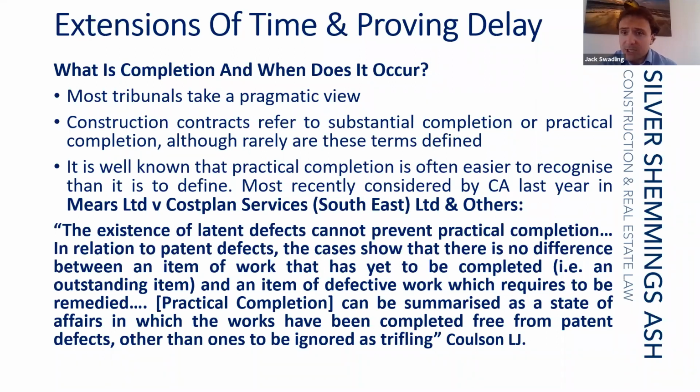And the way that the standard forms of contract deal with this typically is with reference to practical completion, which I'm sure many of you will be familiar with. And this is once the works reach a certain stage of completion, that typically in inspections carried out by the contract administrator or architect, they certify either that the works are practically complete, or otherwise they will provide a list of what needs to be done for practical completion to be certified.